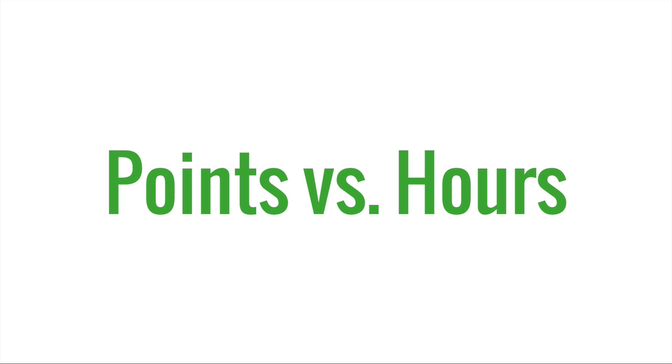Now, most projects of this size tend to estimate either directly in hours, or they use points, which is sort of the agile term for a dimensionless measure of how long a particular feature will take. Sometimes you kind of fudge this with what they'll call ideal hours, which really is points by another name. I've always wanted to be in a situation to make this even more abstract. I've often lobbied to call them gummy bears on different projects, but I've never actually had anybody take me up on it.